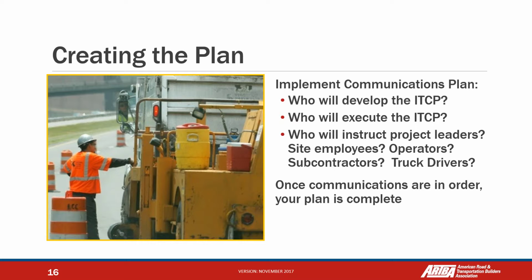Sometimes we need to revamp or modify the diagram according to the circumstances, according to the stage of the project. Sometimes we are going to move the access zone and create another access zone or exit zone according to the project, because in roadway construction we are constantly moving and also dealing with different kinds of traffic. So all these considerations should be provided, not necessarily in the diagram, but it is the context in which we are working, and we have to be aware of the possible changes of the diagram.